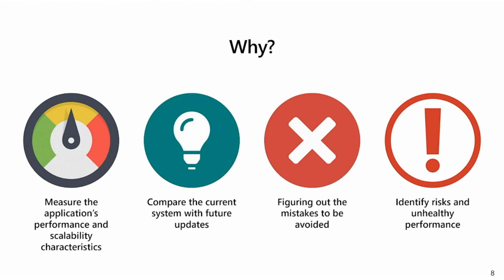And also, we are trying to find any risk or any unhealthy performance through the day in the life testing. Sometimes there are fewer performance issues in the first few months after system go live. But when the data is going up day by day and there are different new features or changes in the system, what is the performance maybe 3 months later? So you can find out the risk or any unhealthy performance in the day in the life testing, to find out the future issue and make sure the go live succeeds, not just on the first day only.